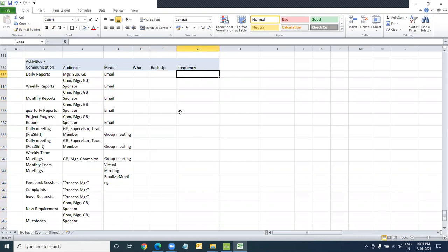Frequency. Now, daily reports. Do you want me to wait the entire day to receive the report? No, 3 p.m. every day. Weekly reports. Which day? Weekly frequency. No, that doesn't make sense to me. Which day are we talking about? Okay, Tuesday. What time? Okay, it should be available by 1 p.m. Perfect. That makes sense. Monthly report. What day? Last day of the month. And what time? Say 2 p.m. max. Okay, that makes sense to me, when this report is supposed to be received.